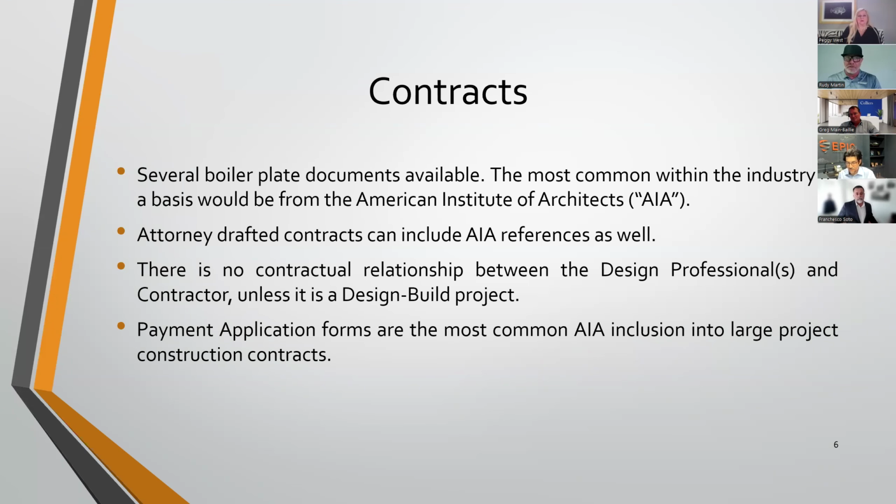Daniel talked in the beginning, when he was introducing himself, about the risks and the gaps. You need a whole team to kit this together. Greg's going to work with Frank, and they're going to work with Ben, and this is your team, and they're going to make sure that those risks are avoided as much as possible, and that all the scopes of work are clear. We've been on projects where I had a scope of work with A, B, and C, and we come across D and they're like, well, are you going to do that? I'm like, I didn't bid on D. And they're like, well, that needs to be done. And yeah, it does. Talk to the engineer and the owner's rep and have them add it.